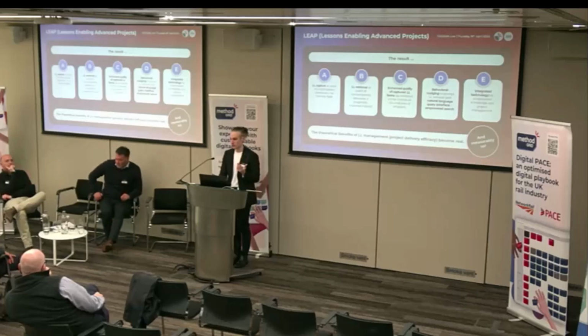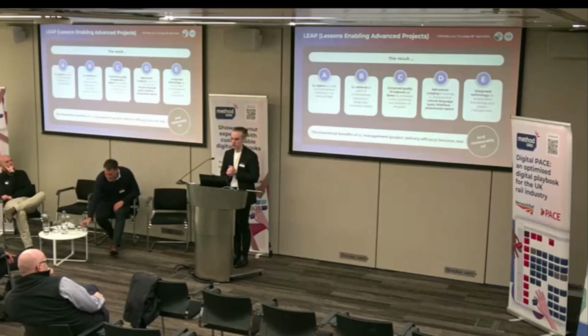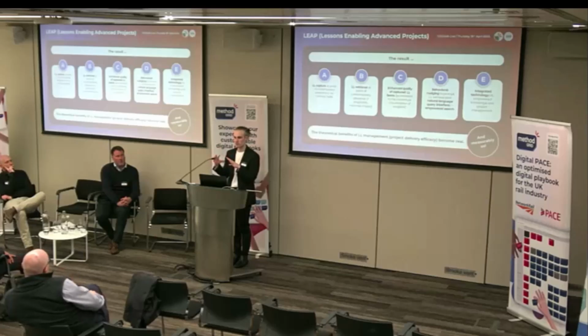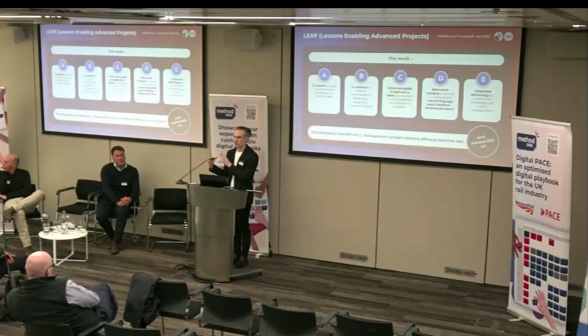So yeah, I think this was an interesting discussion we had last time we were talking about Project Leap. The ultimate goal of a lesson is that you update your process. You get a little prompt saying, here's a lesson. Well, that's great, but then the same problem is going to happen again unless it's embedded into your process. So you update your grid, and then the next time someone comes along, they don't need the prompt because it's been fixed. It's been embedded in your process. They follow the process. They don't need the lesson anymore. The lesson can be retired because we have actually learned it. That's the ultimate goal of all of this.